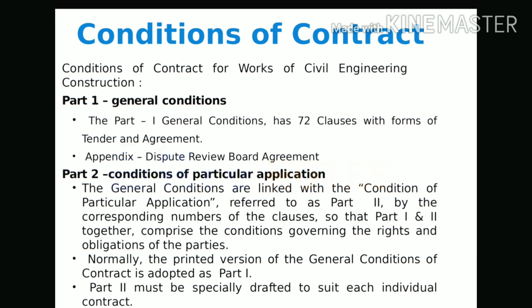Efforts should be made to resolve disputes between the owner and the contractor through mutual discussions and negotiations. An arbitration clause may be incorporated in the contract to settle disputes not resolved through mutual discussions and negotiations.